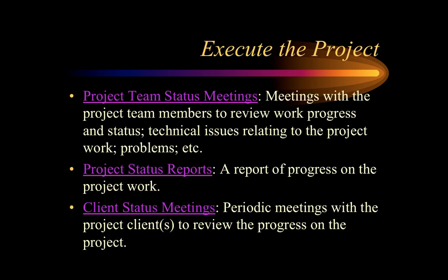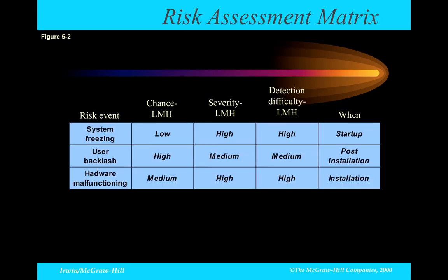All right. In terms of executing the project, we have project team status meetings so that people know what's going on, and usually do this routinely, either on a daily basis to get updates. Project status reports, so you may ask for weekly status reports on various parts of the project. And then you have client status meetings when you meet with the client to give them an update on what's taking place.